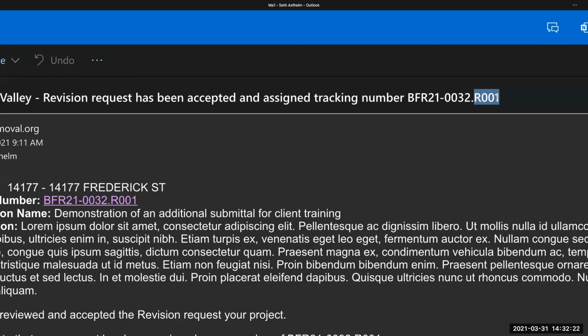So revisions to approved plans will be numbered with an R number following the original number that it was opened from. Deferred submittals will be opened and counted using a D number. So you would see a .D as in Delta, 001, 2, 3. And on the landscape services side, any as-built that's submitted will also be numbered with a .AB, alpha beta, as-built, 001.